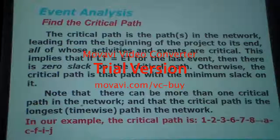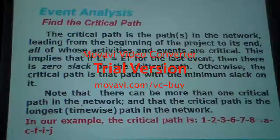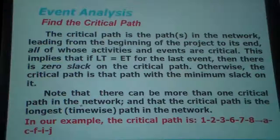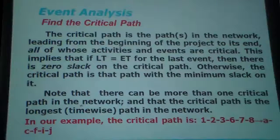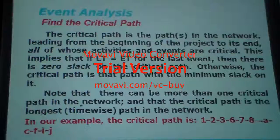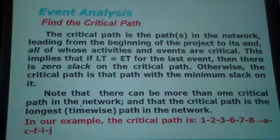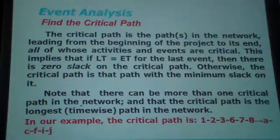If we add one unit, then the whole project has to be stopped. However, the non-critical path — if you delay it, it will not affect the critical path or the total time of the project. The critical path is that path with the minimum slack on it — it should be no slack. But if there is some delay, it will be minimum slack. Note that there can be more than one critical path. For big networks and projects, there may be more, but the critical path is the longest time-wise path in the network. In our example, the critical path goes through events 1-2-3-6-7-8, and activities A, C, F, I — that is A to C to F to I.